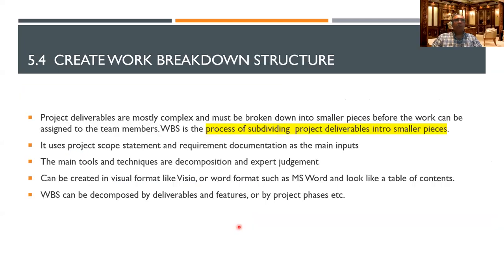So that is the purpose of the scope statement. And we said that once you have the scope statement, you will make what is called a work breakdown structure. The main purpose of it, as you can see from the name, is that you are breaking down the work into different categories, into different groups. The main purpose of the grouping is to show which ones you can allocate to whom. You need to divide the work into smaller pieces so you can assign them to different groups, different people, or different teams. That is the main purpose.